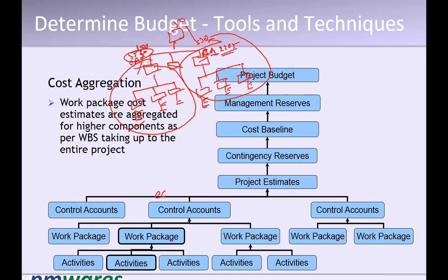So in a multidisciplinary project, if a couple of functions are working together, you can give the function X, say the R&D team, the budget for the R&D team is this much. For the production team, the work is this much, and the cost allocation or budget is this much. So you distribute the total budget in that sense, how they're going to spend, and those are called control accounts. Your accounts actually measure or track the cost through the control accounts. We normally call them cost centers.